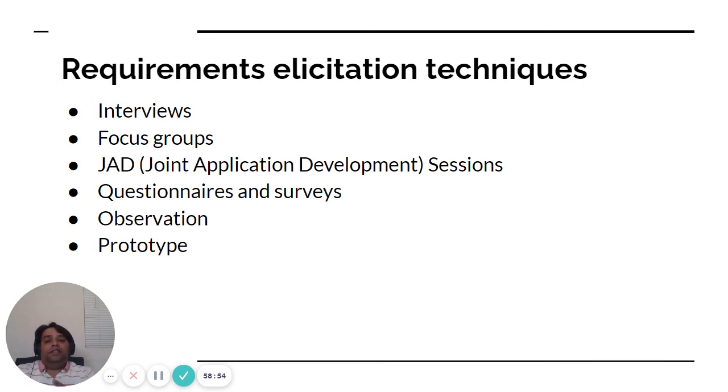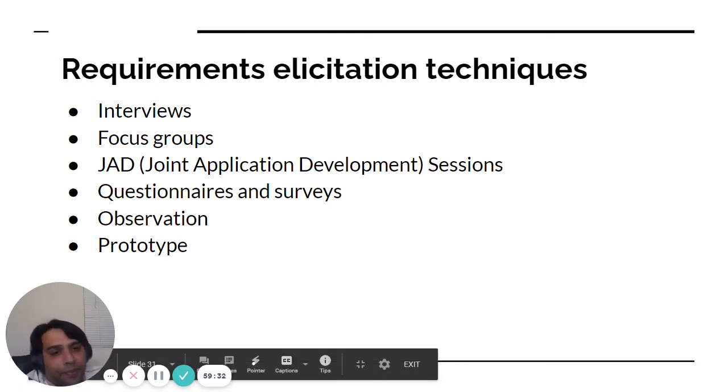Because of that, each camera is functioning correctly. Before they move forward and incorporate all the cameras, they will test a prototype with a single camera doing certain functionality: whether the single camera can measure the depth of a photo, whether it can blur the background, how it identifies the object and focuses, and whether the camera takes multiple pictures and picks whichever is appropriate, right? Those kinds of things are considered prototyping.